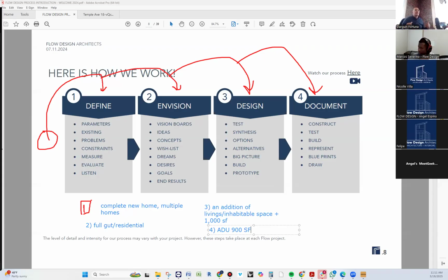so that you can say things like, you may be required to provide a Hertz rating. If you don't have one, we can get one. We can send you a list of Hertz raters, which we have, by the way. So we don't necessarily have to retain them ourselves. We can have the client retain them themselves. Marcos and I are pushing towards the client hiring their own Hertz rater themselves, but we understand there are sophisticated clients that this may not apply for.